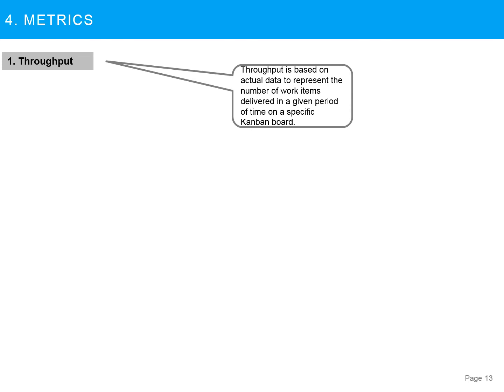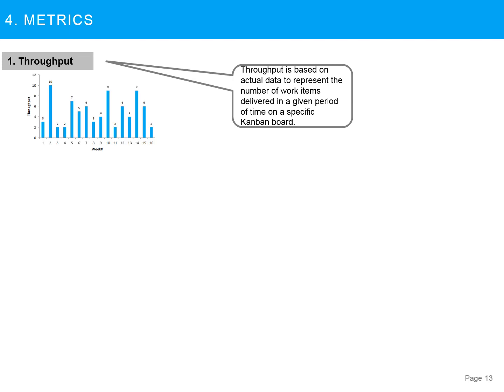Like the development team would probably use per week or 2 weeks measure, but a support team, which, let's say, works on 20 to 30 items per day, may calculate throughput per day. So here you may use a throughput chart that shows how the throughput or velocity is varying. It shows the week number, week after week, how many items the team is finishing. As you can see here in this example, there is not enough consistency.